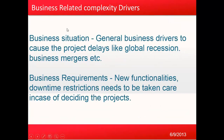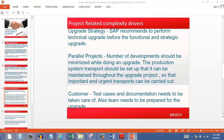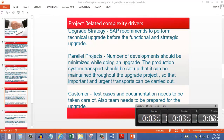Finally, business-related complexity drivers include the general business situation — drivers such as global recession or business mergers can cause project delays. New business requirements, new functionalities, and downtime restrictions also need to be considered when planning the project. That covers everything for this training session — thank you for joining and have a nice day.